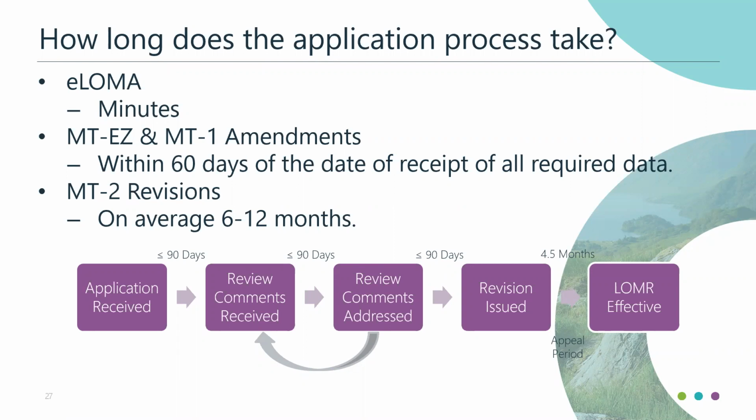One thing to note there is they could take 60 days to review the initial application. If you were missing information, then you would have to submit that, so your timeframes could be extended beyond that. But if you're perfect, you submitted everything exactly the way they needed it with all information, technically speaking, they should have their reviews complete within 60 days.